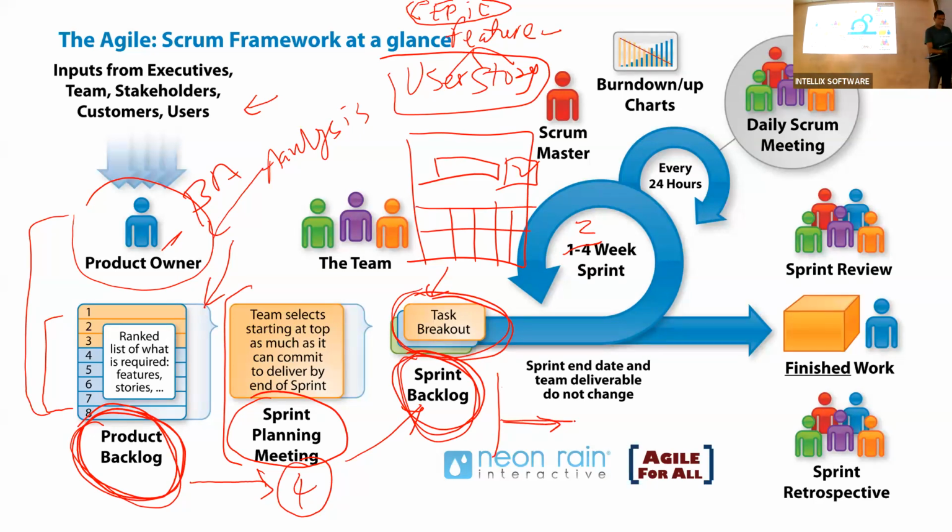So from that week to, let's say, Tuesday, the week after, that's 7 business days here, right? Developers are developing it, and you are writing your test cases and everything. And on Tuesday, they will have a working software delivered to you in the test environment. So they are working in the development environment. Tuesday, they will give it to you in the test environment so that you can start executing your test cases.